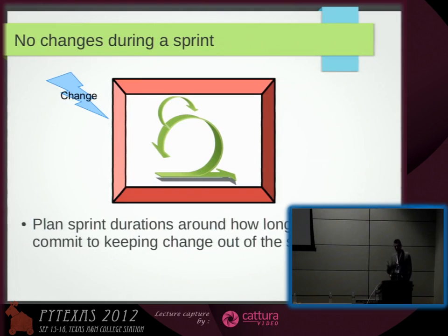The other important thing that we already mentioned is that during the sprint there are no changes. The responsibility of the team is to commit that they're going to do something. But then we really have to give them the best possible environment to do that. So we don't want to say, oh, we have an important visit. I mean, sometimes you have to do that, but if you ask them to stop doing that and do something for me, that's not going to work. You have to really give them an environment where they can do what they committed to.